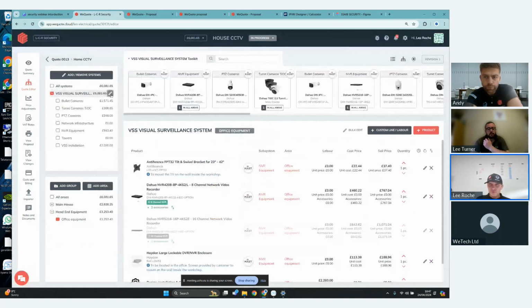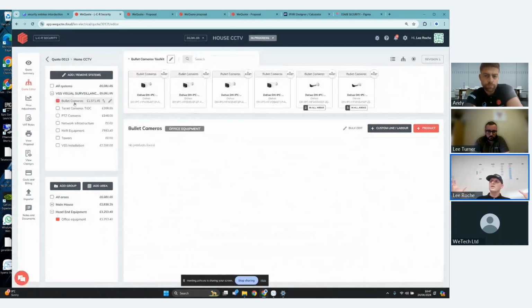Okay. And then as part of that, you have these things called subsystems, which in our heads, if we have a security system, that is broken down into either the types of cameras that we're going to be selling to the customers, the networking infrastructure that everything all hangs off the back of, and then even down to racks, maybe towers, and then your installation as well. So we're breaking that system down into these subsystems to work out like a nice view of our costs.